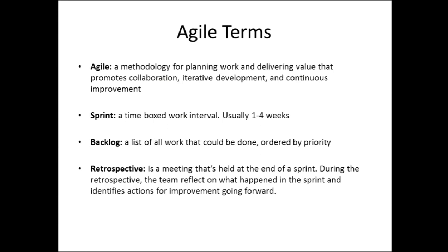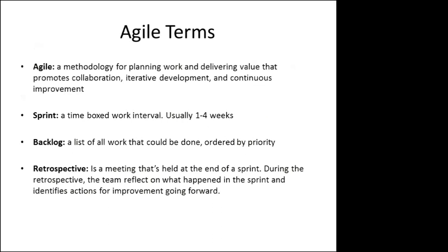So if we were to do a sprint, you can almost consider that right at the moment we're doing a sprint right now. I'm trying to do this in a 1 hour set. But over the course of 2 weeks, your sprint backlog, the to-do column, would be everything that you want to get done in that 2 weeks. You are committed to that. Anything in addition to that, outside of the sprint, is called the backlog.